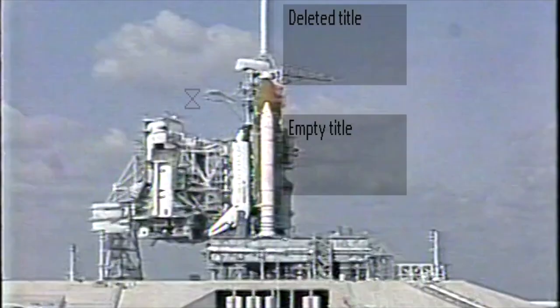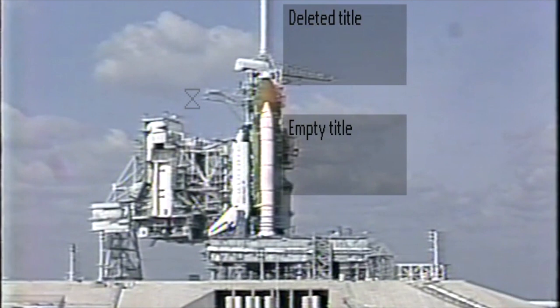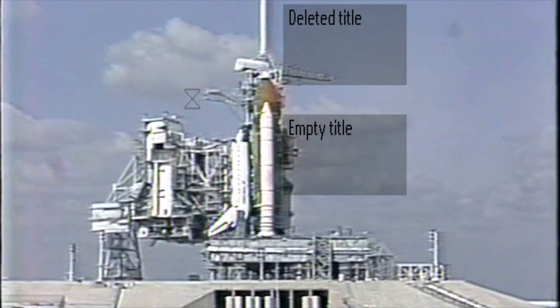Termination of today's event. Our constraints, lock drain deck, estimated hold time is about 4 minutes based on the short-term replenish test that we did this morning. A hold has been requested between T-minus 9 minutes and T-minus 31 seconds. Countdown clock will be restarted upon successful resolution of that problem with a go survey made of all elements. Firing room launch team, disable telephone ringers at this time. Ingress and egress of the firing room will not be allowed after resuming the count at T-minus 20 minutes until after recycle or critical safety is complete.